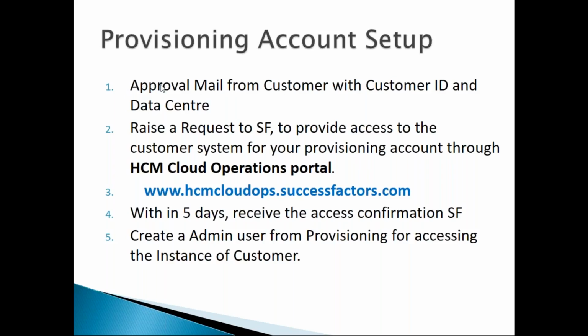So once we get that approval email with those details, here in this HCM Cloud Operations Portal, attaching that approval email, we can raise a request. That will be our first activity once you are allocated to the project. Even before going for requirement gathering or anything, we are first required to concentrate on that. In that process, one second, let me open one document and show you.